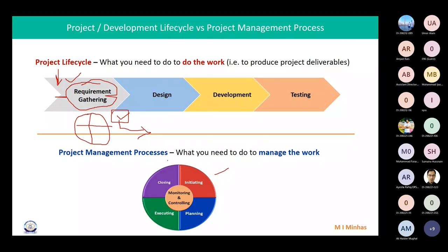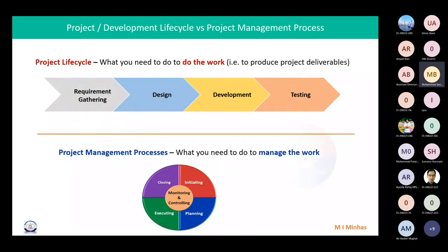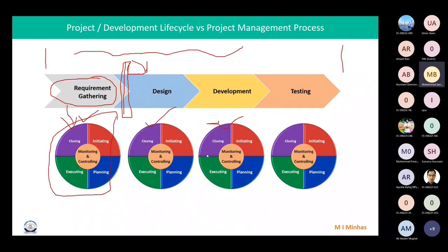So now look, what I'm saying is, if this is the case, you plan everything for all the steps, all the phases at once. So this is the case. But sometimes you say that we will not move to the next phase until the first phase is clear. And to enter into the second phase, you again require an authorization. So what you do, you only plan the first phase. Why plan everything if we are not sure that we'll be entering the next phase? Like in the case of feasibility, you cannot move to the next phase if your feasibility is not productive. So why would you plan how you will acquire and purchase the land, how you will construct the dam, what materials you would require? Why plan that thing?